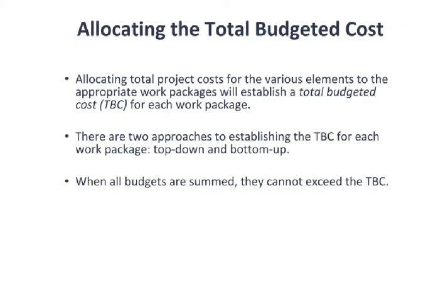As it states on this last bullet, the budget for that work cannot exceed the TBC or you're in trouble. You are now going to run out of funds, you're going to have issues satisfying the customer, you're going to have issues meeting schedule or deliverables. So this kind of defines a hard limit of how much money is available.